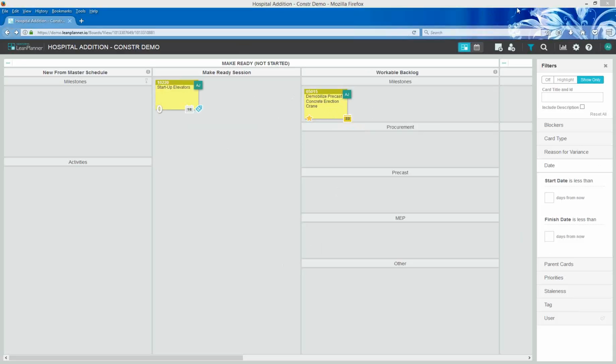And it seems really easy: yes, I'm committing to this, I'm dragging it into To Do, I'm working on it, and when I'm done, I slide it over into the Done column. If we want to look at a dashboard of analytics to see how we're doing with completing things, we can do that. But before we even generate those graphs, we can look at the board and see how many things are in the yellow or in the red. That gives us a great visual cue before we even generate analytics. So that's exactly my purpose.